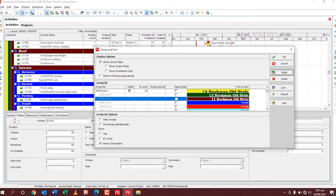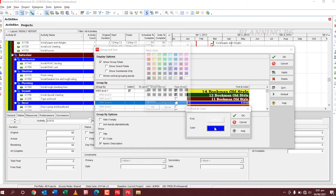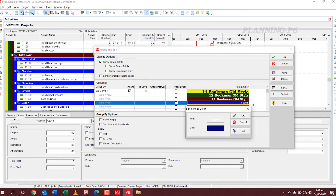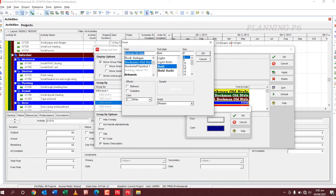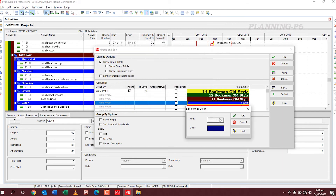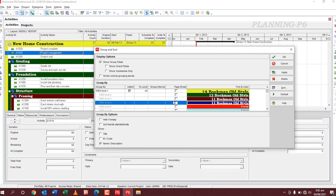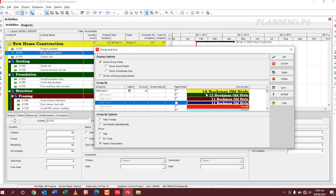Now I want to change the last one — this program supports up to WBS level four. I want to change the level four color as well — I want a dark blue color. Bookman Old Style, bold, font size 11. Apply. With this method you can change your colors up to WBS level 20. You can see the fonts: Bookman Old Style 14 for level one, 12 for level two, 11 for level three, and 11 for level four. Apply.